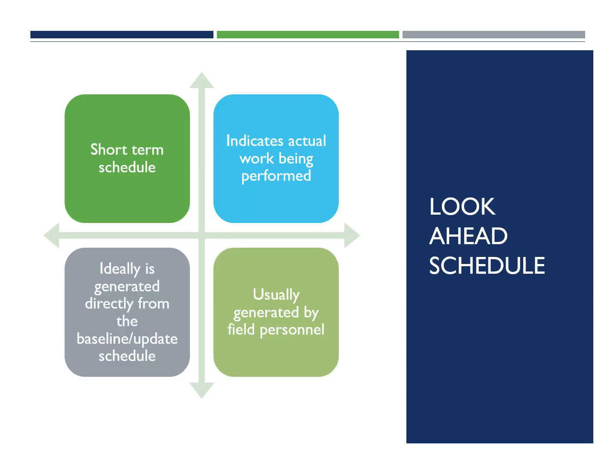The look ahead schedule. We always talk about the look aheads in our progress meetings. It's just a really short-term schedule. The spec will call out if it needs to be a 2, 3, or 4-week schedule. It discusses, in between the update schedules, work that is actually taking place, what's going to go, who's going to be on site doing what next week.